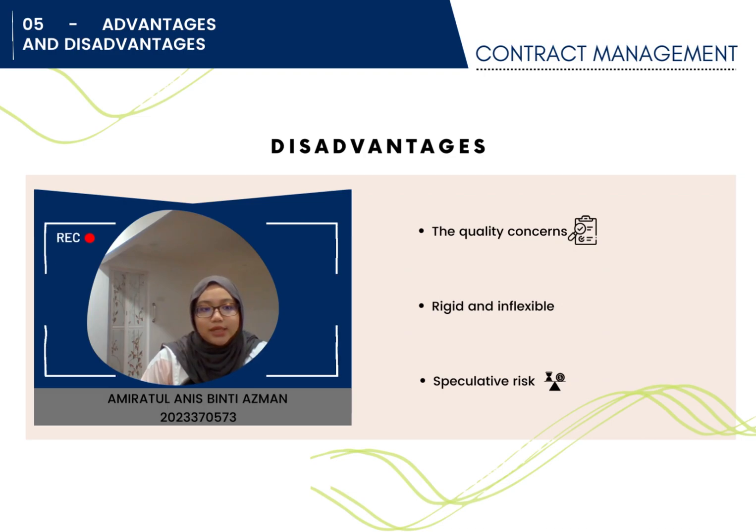There is a risk that the design won't be perfect in the long term because the contractor is the only party that manages both of the design and the construction phases. So it might be a concern in a case that the construction or the quality of the design might require a lot of expenditure and time to fix it.